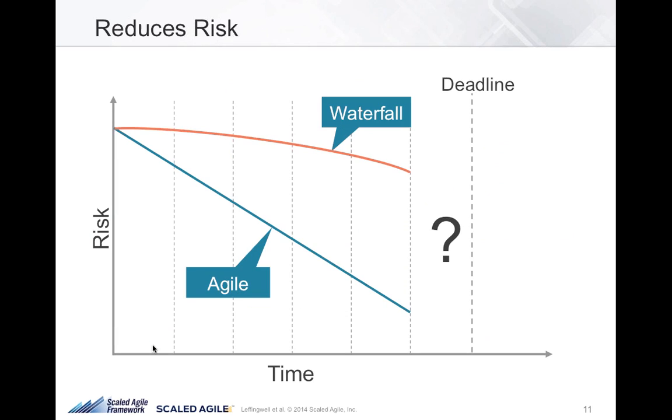And I think one of the biggest downsides to our traditional forms of development, the waterfall development model, was that we really didn't know anything until the end. I'm reminded of a program that I was engaged in 3 or 4 years ago that was very near the delivery of basically a fixed capability on a fixed schedule. And we were within a couple of months of about a 1-year development effort, and no one could actually tell because the system had not been integrated yet. We didn't even have enough integration and feedback to start to understand the defect status.